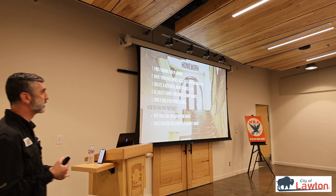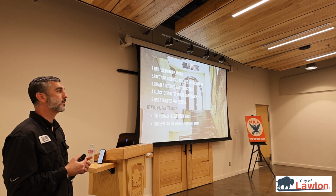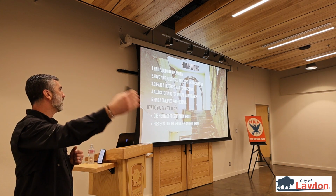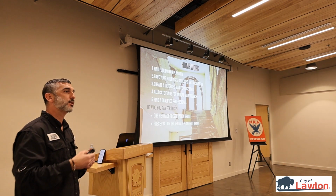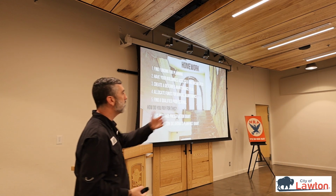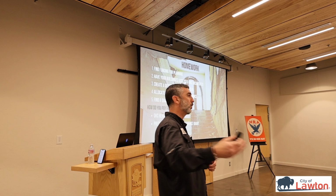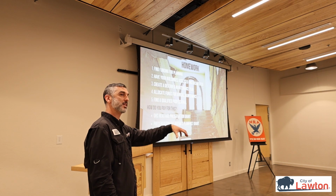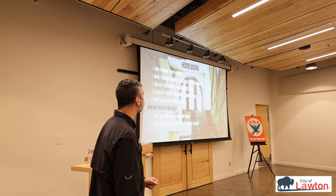Now, have your buildings assessed and documented, because even if the project isn't going to happen next week or tomorrow or next year, now you can start planning for it. How much is it going to cost? How much do I need to start asking these donors for? What grants do I need to apply for? It all happens with, we have to know what's happening and what needs done.